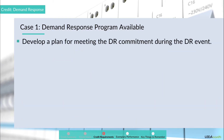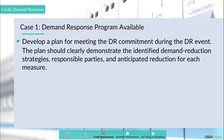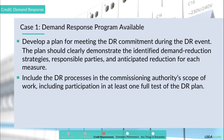Activity 3: develop a plan for meeting the DR commitment during the DR event. The plan should clearly demonstrate the identified demand reduction strategies, responsible parties, and anticipated reduction for each measure. Activity 4: include the DR processes in the commissioning authority's scope of work, including participation in at least one full test of the DR plan.